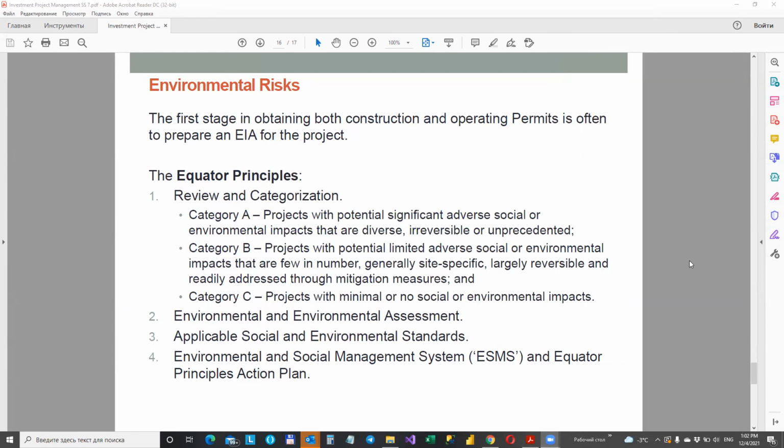We'll discuss this issue. The project's impact on the surrounding environment during both the construction and operation phases may need to be considered. An environmental impact assessment, or shortly EIA, may be needed for this purpose. Sponsors cannot rely on keeping within environmental laws and regulations. They need to consider whether any environmental aspects of the project leave them at risk of opposition to construction or operation of the project, indirectly discouraging lenders from getting involved with it.